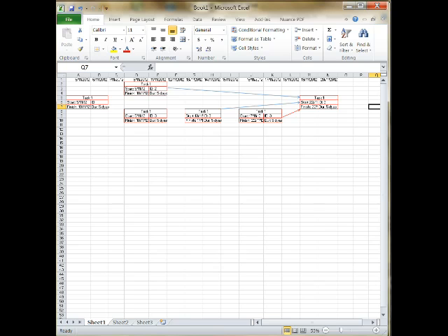So if it's going to take us 3 months and 5 days to go through one flow, and it's going to take us 5 months and 3 days to go through another flow, following your arrows, you can't just jump from nothing. You must follow the arrows, so the predecessors and successors that are in the work breakdown structure. The longest path is the critical path.